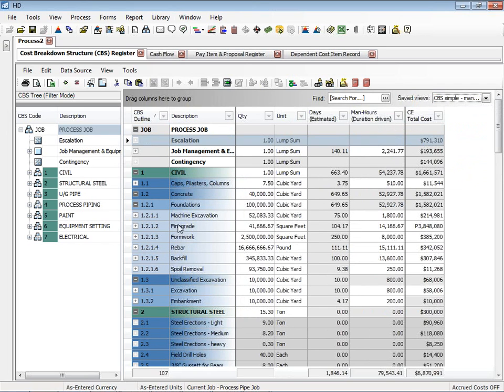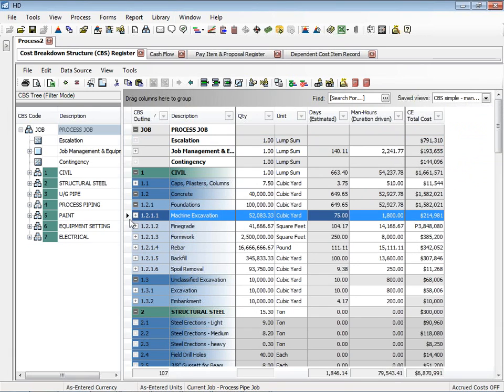What I'm going to do now is focus on those earthwork items that we moved around on the schedule a little bit. After further evaluation, maybe we realize those items are going to be more challenging than we thought. So I'm going to apply a factor to a couple of those earthwork items, and that will extend the duration. You can see right now those durations are 75 days, 104 days, and 250 days. Let's take the first two items.